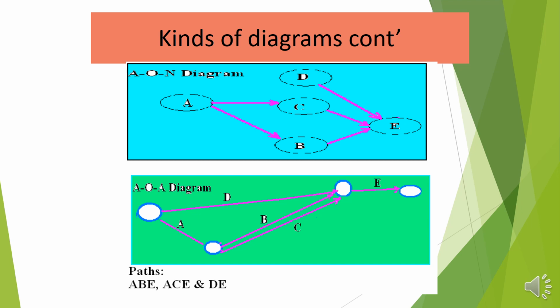The node shows activities like A is the beginning activity, so is D. Now the arrows, like we have an arrow from A to C, show you that work flows from A to C, and so A is a precedence of C, so it is a precedence of B, that work flows from A to B and C, or A, B and C actually use inputs from A. Now E gets its inputs from B, C, D, and so these are predecessors or precedences.